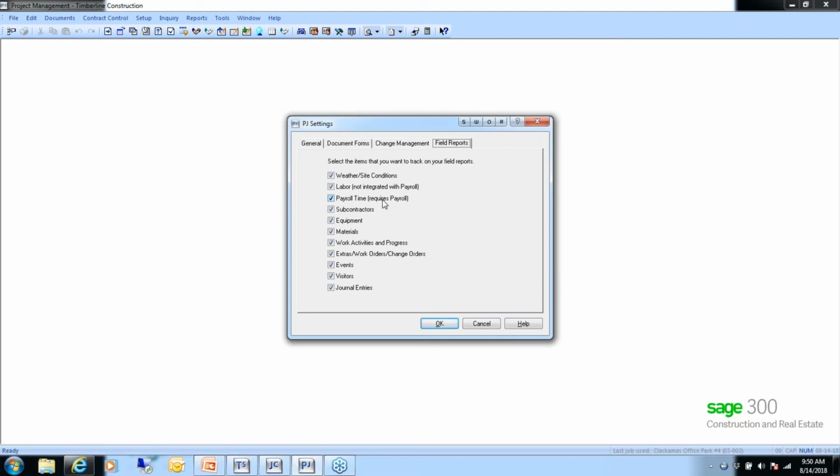Okay. If you're doing commitments and you're going to do a commitment change order, this checkbox here to automatically assign the commitment item column, you might want to check that box. Otherwise, if you're changing a specific item, you'll need to make sure that that line item is on the grid.